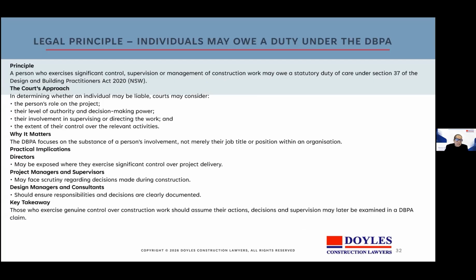So, what that means is you should document your role and your decisions. One of the most important lessons from Bolus is that the courts can and will look at what the person actually did on the project. Simply holding a title isn't enough, but where an individual exercises real control over construction activities, personal exposure may arise. And this reinforces the importance of clear governance, documented decision-making, and appropriate insurance arrangements.